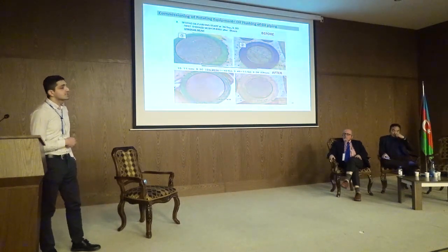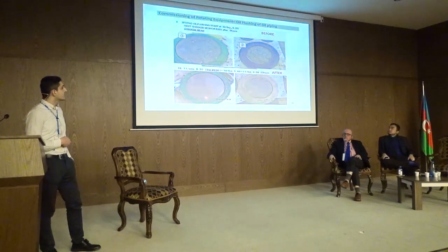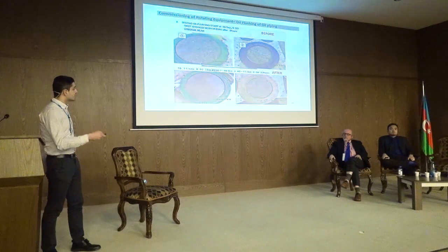And of course, we have some acceptance criteria regarding the size of the particles and the number of particles on the meshes before we can proceed. And then we do the mechanical run test.